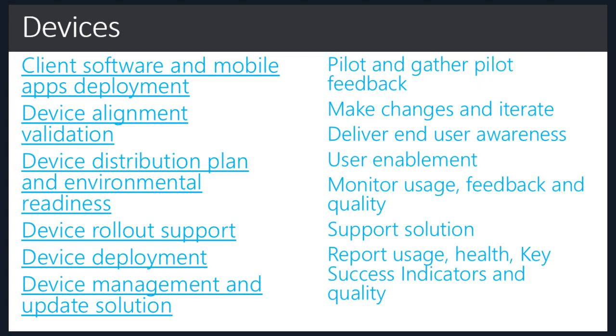In large organizations with distributed locations, the Office 2013 SP1 upgrade that hovers around 1 GB in size can be a challenge. And therefore, planning for the client update deployment must be done early on. There are also more and more features that will only be introduced in the click-to-run version of the Skype for Business desktop client. And if the feature required by the organization is only available there, plan for the replacement of MSI-based installation with click-to-run based installation. So the actual work breakdown of this task will involve a lot of work that needs to be planned for.